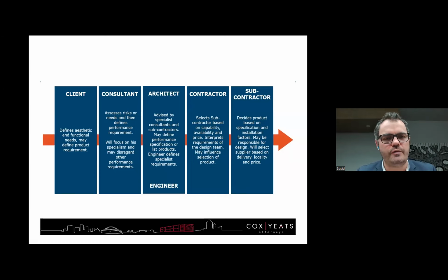And also, you've got to look at design obligations, supervision obligations, inspection obligations, because for me, those are the three biggest areas. And a new area that's come up a lot in the last year in claims is contract administration here. So, for example, the engineer is appointed as the engineer under a FIDIC contract, or the engineer or the quantity surveyor is appointed as the principal agent.